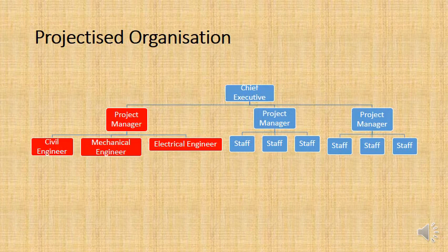The other big issue is that when the project finishes, often the civil engineer, mechanical engineer, electrical engineer, they move back to their companies, and the companies have started moving into a different direction. And so often people lose their jobs when the project finishes. And so that can cause a little bit of anxiety, and it can actually influence people's desire to finish the project in a timely fashion.